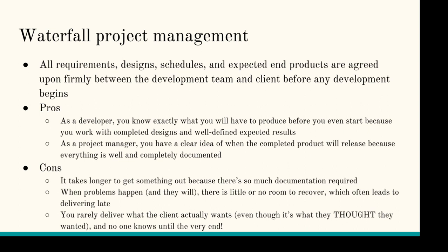So this operating system had been out in the world for a long time, and the operating system I worked on was used in high-performance computing applications, which means that either people's lives depended on it working well, or companies would lose billions of dollars when it didn't work well. So we had to be super careful about any changes that we made in the operating system, and that meant we took a very cautious approach to development, and we didn't make decisions quickly about what we were going to change and how. And in that case, because of the size of the team and the sensitivity of what we worked on, we used a waterfall project management paradigm.